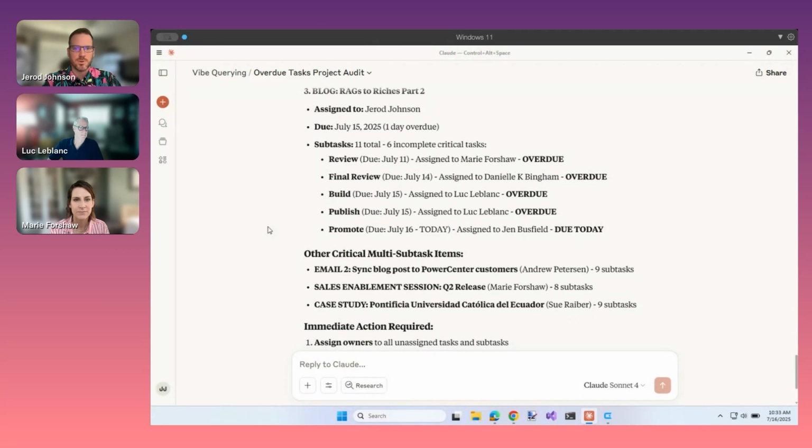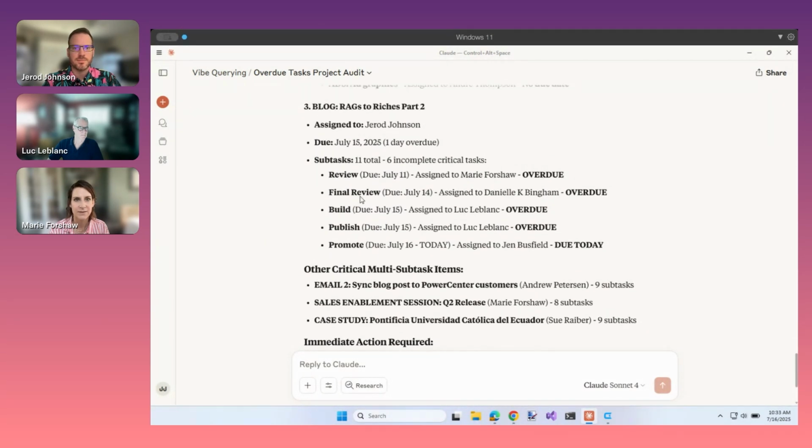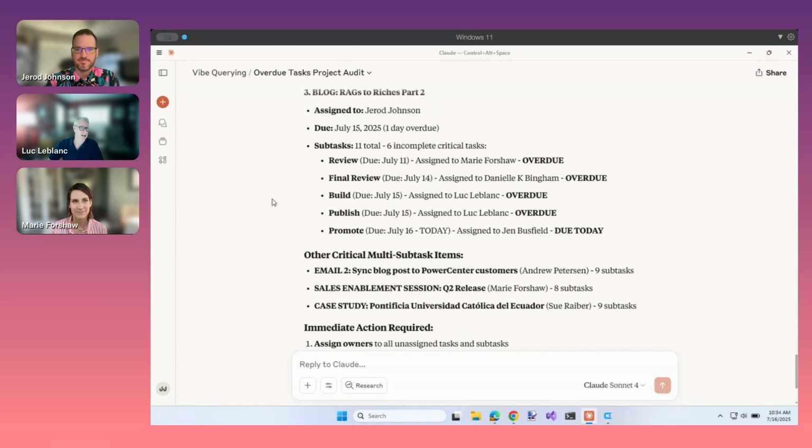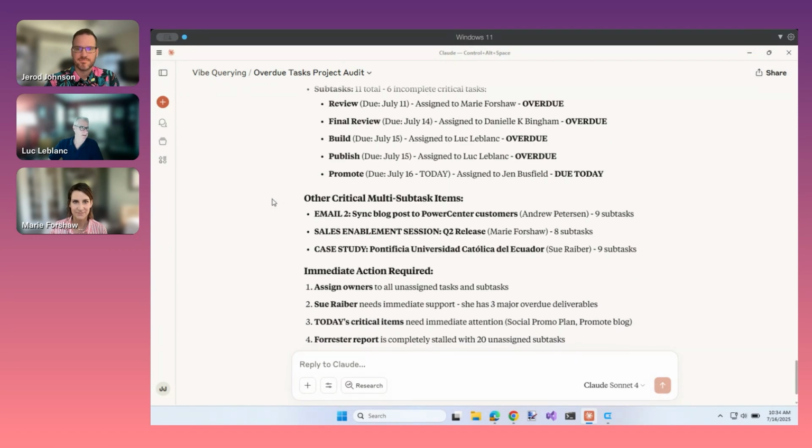So, Rags to Riches Part 2. I know I wrote it. Marie, you've reviewed it. Did you just not check it off? Definitely not. Classic. I feel like what happened is there's a final review that probably hasn't been done, which is causing overdue on the other tasks. So I would get with that person and make sure that he or she has that final review done, and then those overdues would go away. We would switch the dates.